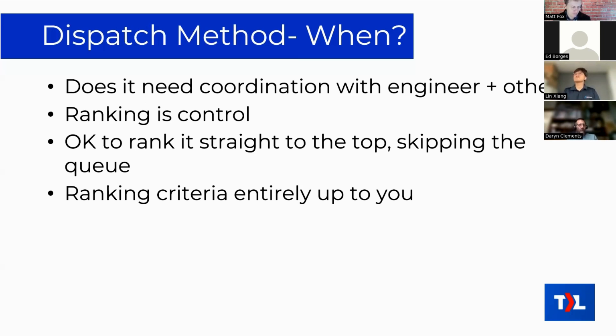Now, by the way, if you're not able to start using the Kanban dispatch methods right away, TopLeft still has a calendar dispatch tool. That means you can begin to assign a member to a ticket. From a particular ticket, you choose the member and you choose the day, and TopLeft will pull up what ConnectWise or Autotask knows about that member's calendar for the day, and it will mark off any times when they're already booked, so that you can put a ticket into somebody's calendar pretty easily from TopLeft.